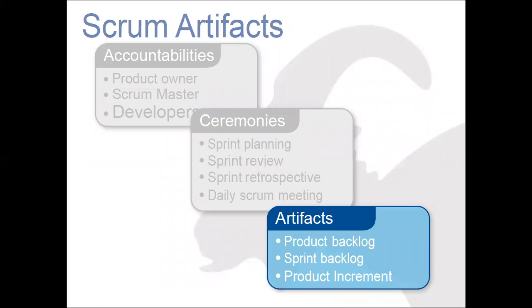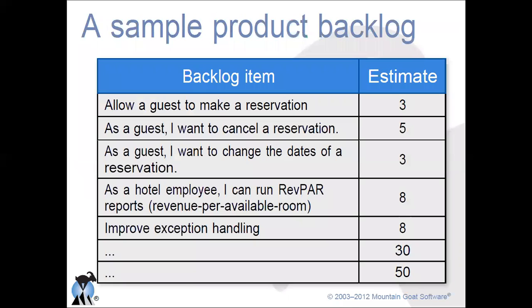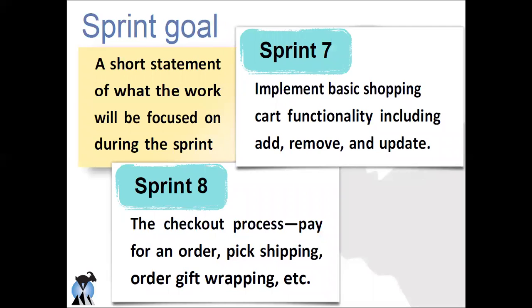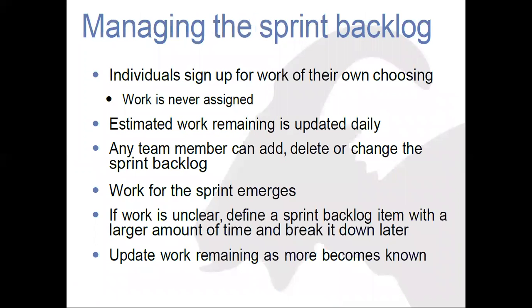The next artifact is the sprint backlog. So here is a sprint goal, and a sprint backlog is here. Managing the sprint backlog, individuals sign up for work of their own choosing. Work is never assigned into the sprint backlog.